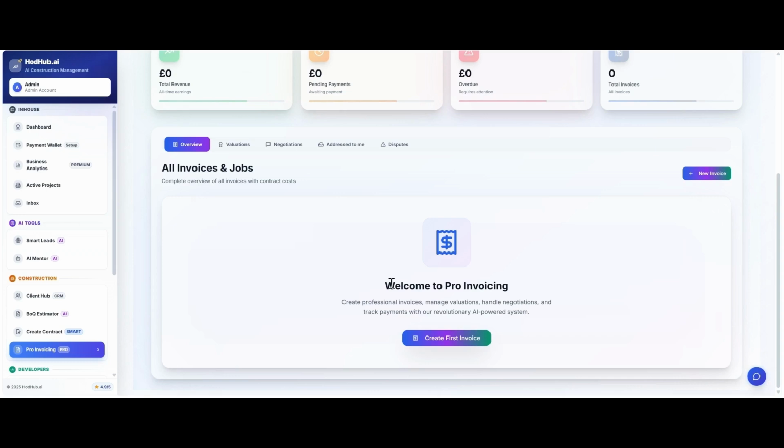That's the section of work that you're going to be doing. You've just completed 50% of the work. You can go to this section, type in 50% requested, hit the button, and the main client or the main contractor that you're working for will get the notification, and they can either approve the documents, or if they don't agree with the amount that you're asking for, reduce it slightly.